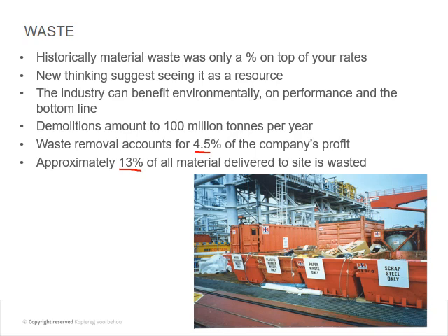There's other items which you can manage well as well, like your site offices. If you manage your tools and sheds and so on efficiently, the fewer containers you have on site, the lower your overheads per day. So that's the stuff that you can think about.